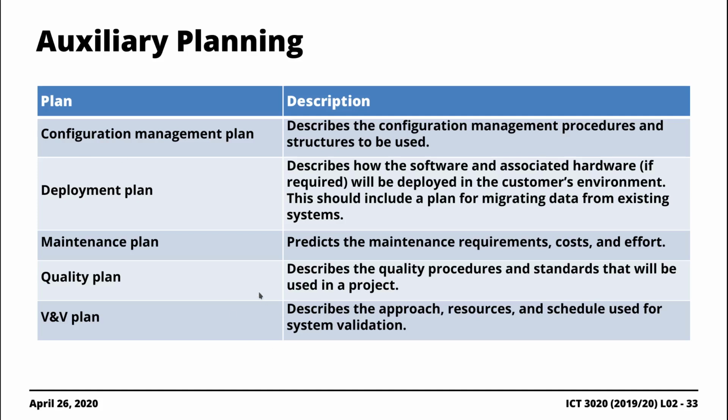You of course need a maintenance plan, depending on the type of contract that you would have signed with the customers, the software customers or clients. It might be the case that maybe they'll pay a subscription, maybe an annual subscription, for you to regularly maintain the piece of software, right? This is tied to the evolution phase of the SDLC, the software development lifecycle, right? So you need a plan for that. And part of what feeds into this plan here is you want to anticipate what sort of maintenance requirements will come your way, the cost involved and the effort, right?